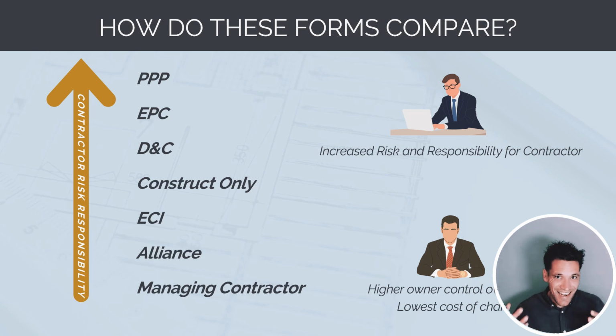But if the owner changes anything, they want one additional light, there will be a huge additional cost to that because the contractor is then not quoting competitively to say they've got to maintain it, they've got to procure it, they've got to allow for the design, they've got to allow for the initial financing costs. So there's a huge cost of any change.